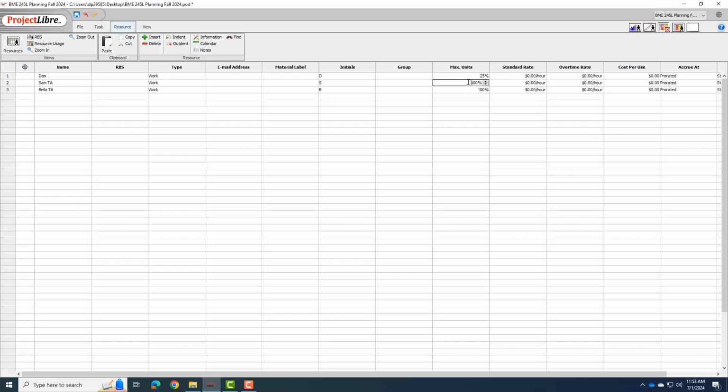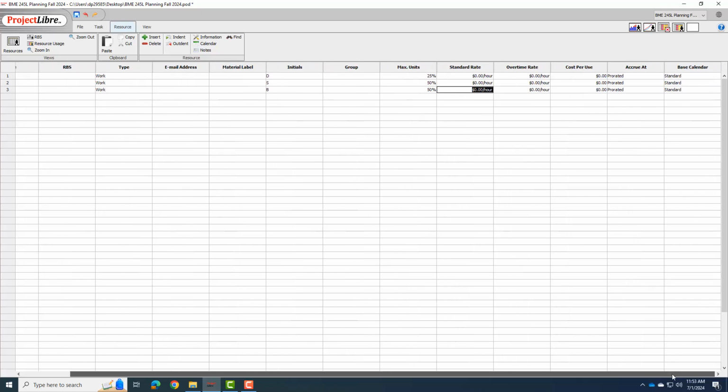The TAs are only supposed to work 20 hours a week because they still have to do their research the other part of the time. So really, I only have the TAs for 50% of their work week as well. So I'll go ahead and put that in there. Again, I could put in pay rates and all that stuff, but I'm not going to worry about that.